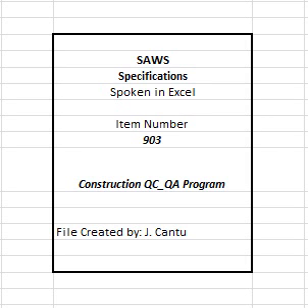The contractor has the responsibility to make themselves totally familiar with the nature and location of the work by site visits and investigations. The contractor shall evaluate all general and local conditions which may affect work and/or costs. The contractor has the responsibility to review the contract documents and request clarification where necessary. All of this is accomplished by asking questions during the bidding phase or submitting request for information, RFI, documents during construction.